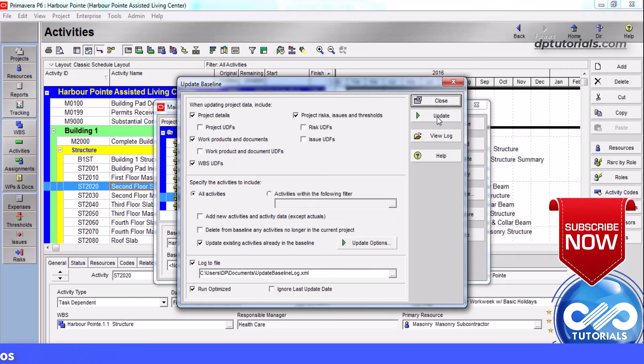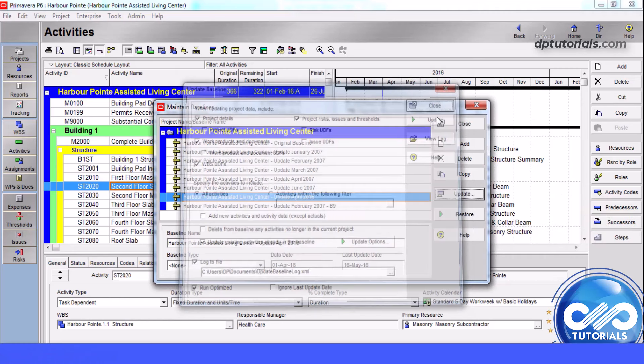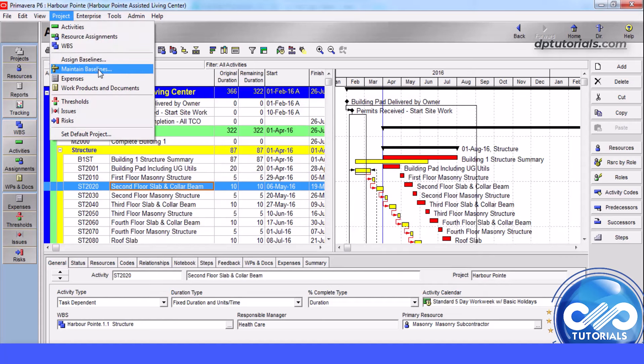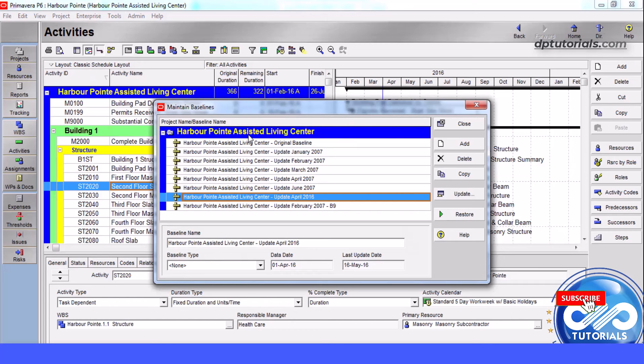Whenever you update a baseline, P6 stores the date on which the baseline was last updated. If you click on Maintain Baselines, you can see this date in the Last Update Date field like this.